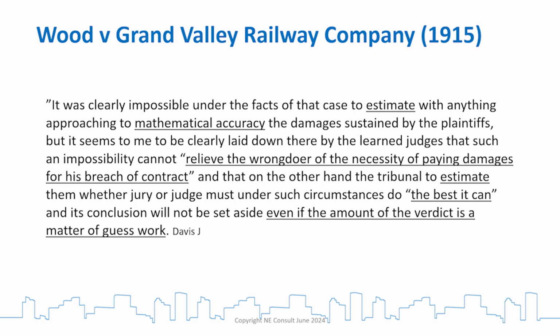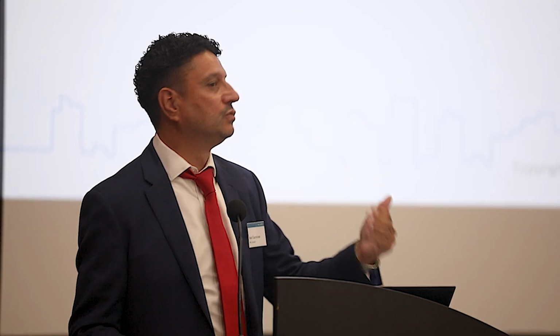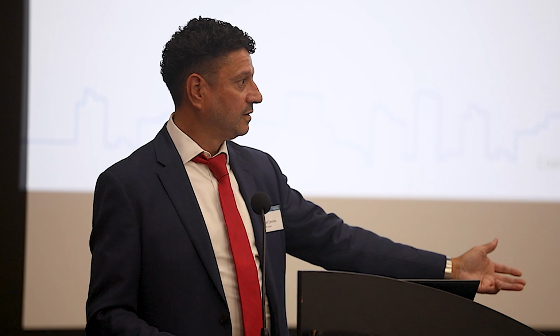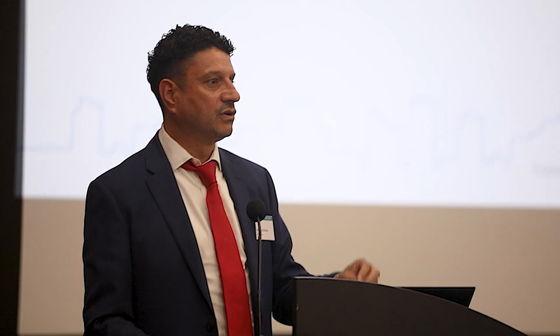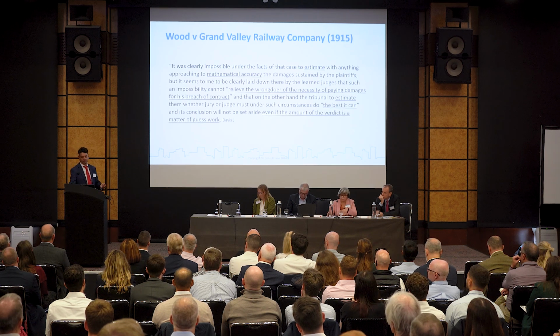So it might be difficult to come up with this assessment. It may be a matter of guesswork, but you still have a duty to do it. If you know something's changed, if you know there's been a delay, some additional work done, you could almost forget about the contractual niceties. You've got to make an assessment. And if you can stand there, go on the job and look at the thing that was the varied work, or you can see evidence of the delay, then your job is to come up with some form of assessment, even if you are struggling to get information about it. If you know it's happened, the assessment cannot be zero, cannot be nil. It has to be something.